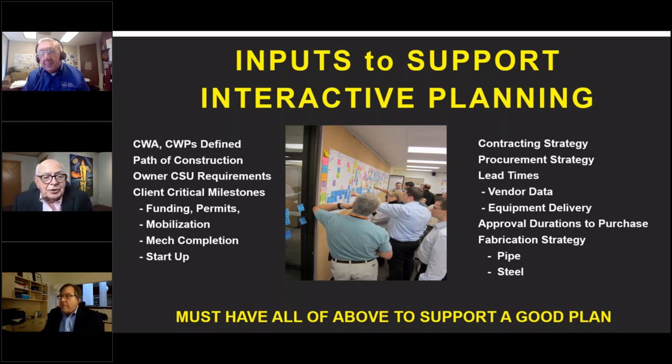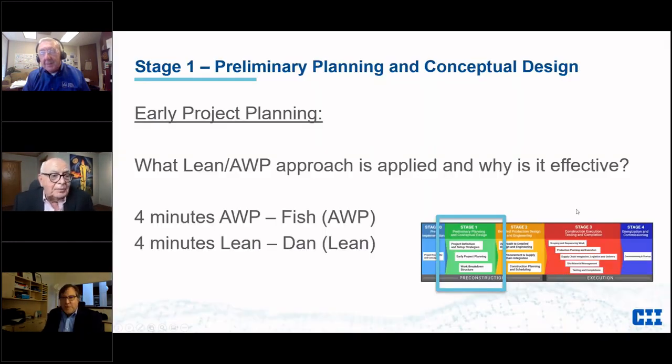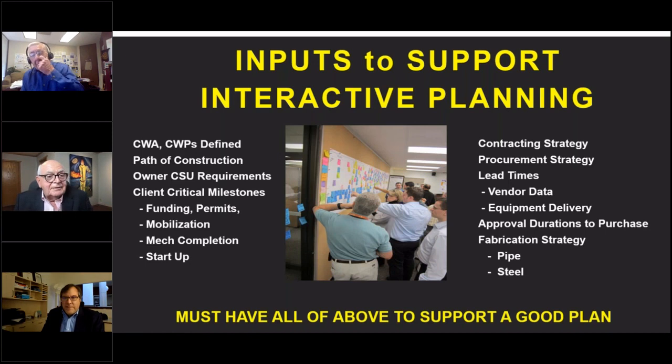So it sounds like an opportunity for process mapping, John. 17 steps may be a few too many. That's the first thing I do. I say, look, here's your 17 steps. Now, let's figure out, do we really need this step? Can I do this step concurrently? So you take those 17 bubbles and you demonstrate to them that if you want this, your project is going to move out 6 months, pal. Yeah. And so then you start getting rid of those bubbles. But if you don't say anything, those bubbles are there and they're going to enforce them. Yep. Perfect. Thank you. Okay.